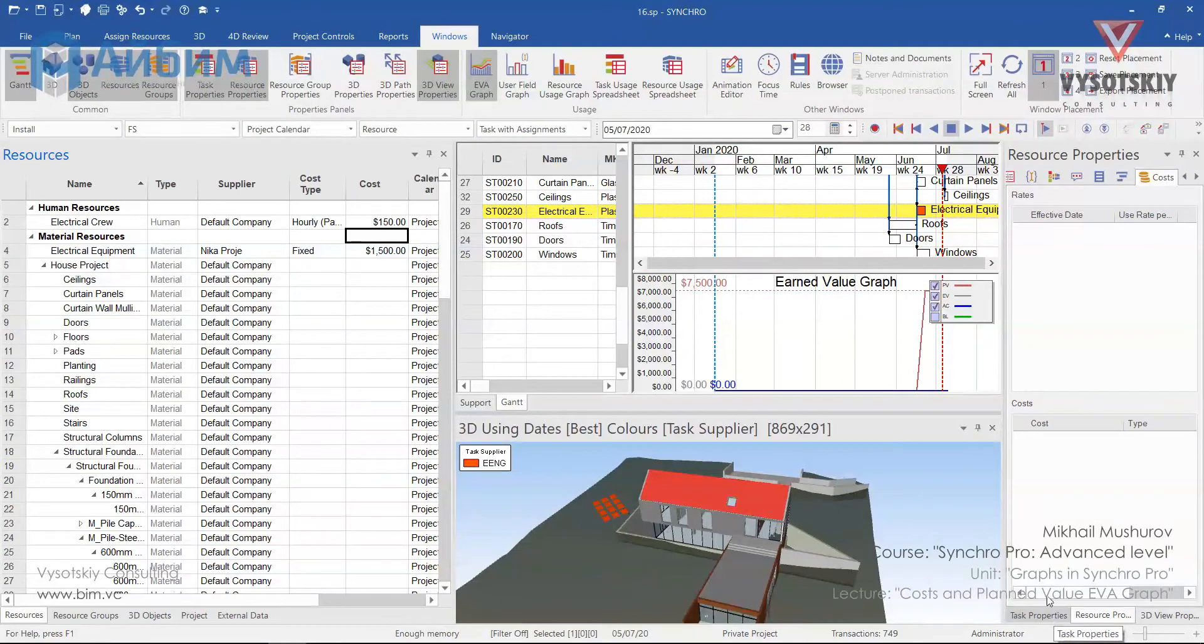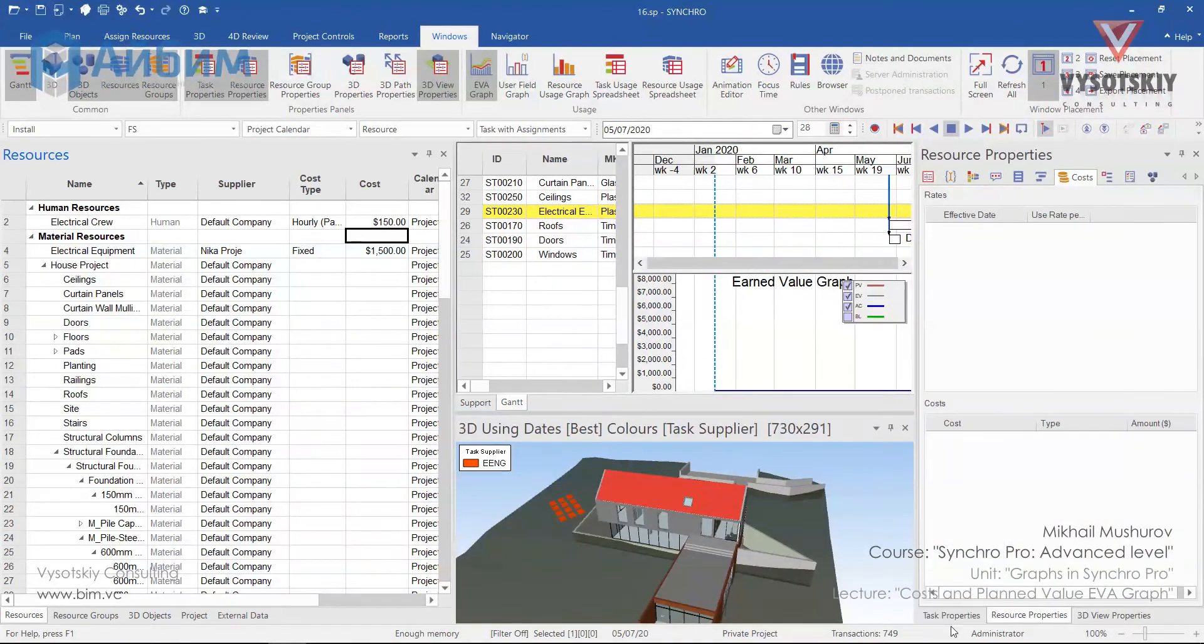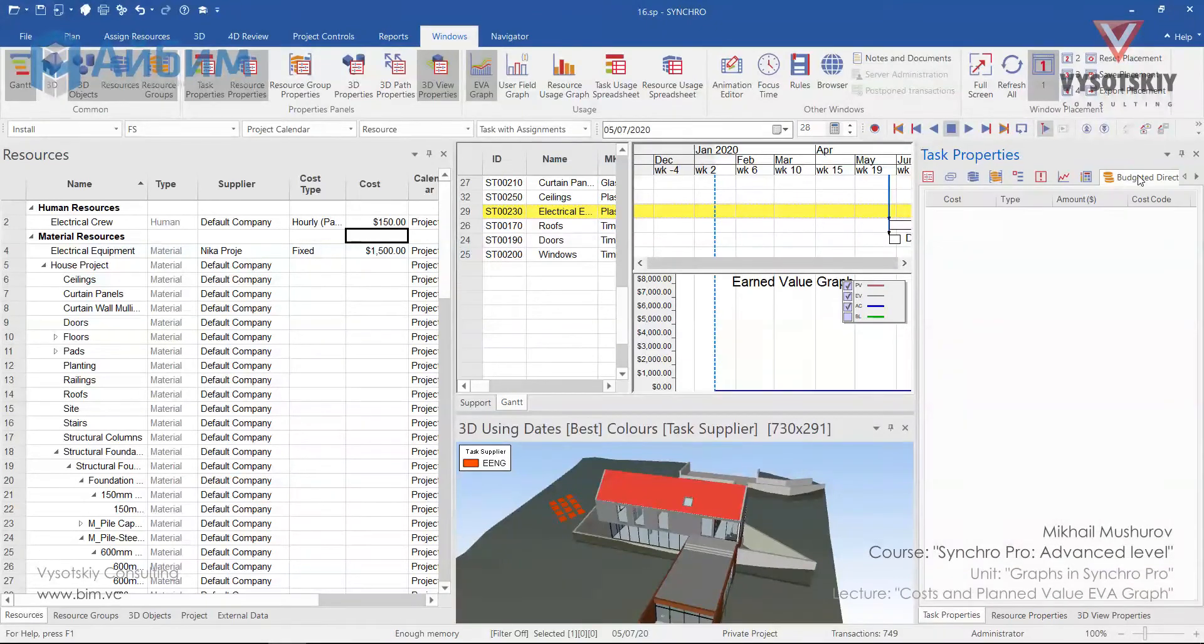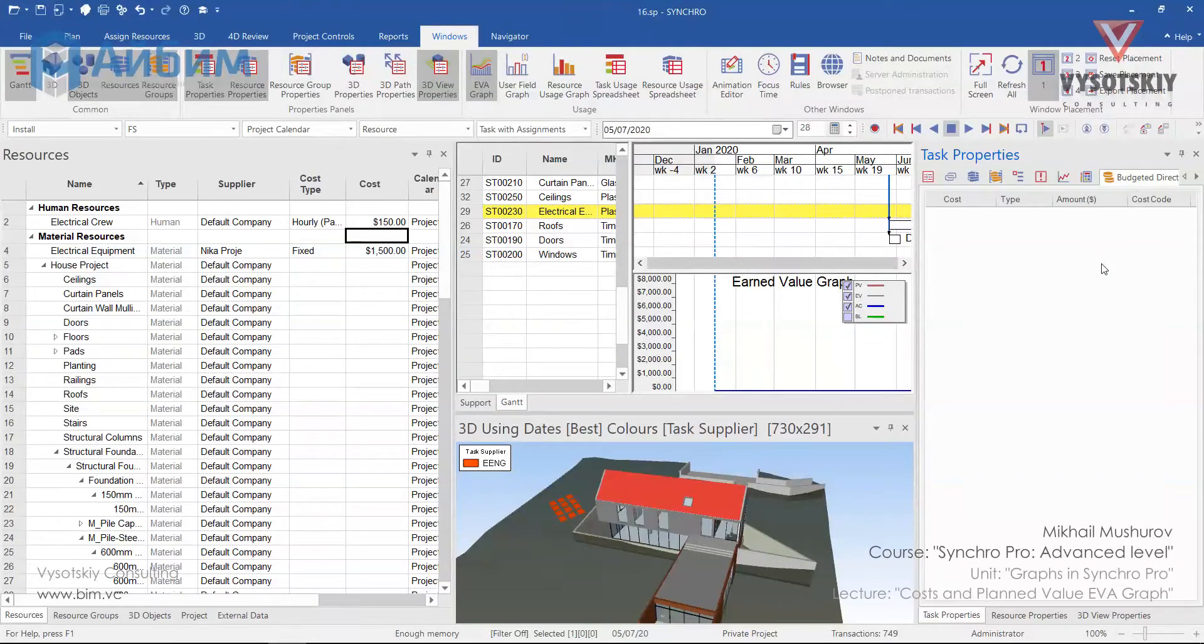Besides resource costs, we have budgeted costs or direct costs. They can be viewed from task properties, budgeted direct costs. These costs related to the task's execution and are not associated with the resources assigned. This can be fixed or variable.